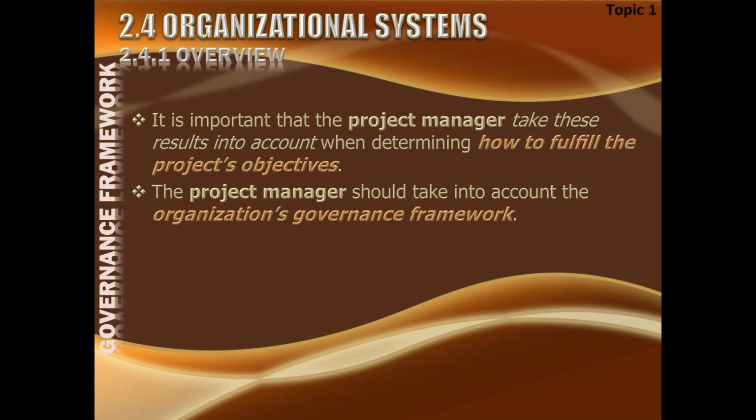Rather, not the project manager, but the sponsor or the program manager, whomsoever is above the project manager, would actually give him the governance framework for running the project. And the project manager would then create policies and procedures within the project in the project management plan. Basically, the governance framework is translated into the project management plan by the project manager. I mean, the project governance framework I'm talking about.